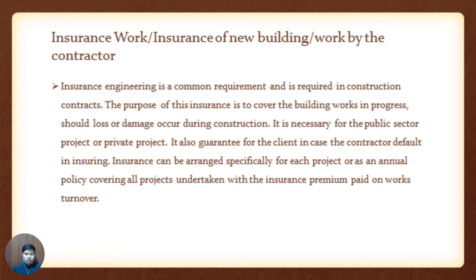Insurance can be arranged specifically for each project or as an annual policy covering all projects undertaken, with the insurance premium paid on work turnover.